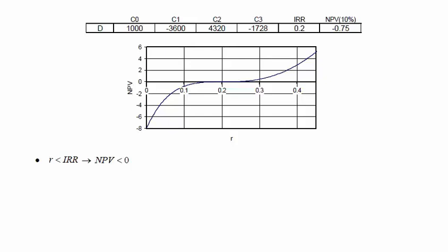To illustrate that, we have this example. In this example, we have a project that starts with a positive cash flow and ends with a negative cash flow. The duration of the project is 3 years. These kinds of situations may occur when we start by selling something in a project, for example, the conversion of an old factory, and then we have the main investment at the end of the next year, and then at the end of the life of the project, we may have expenses or costs related with dismantling of the factory.